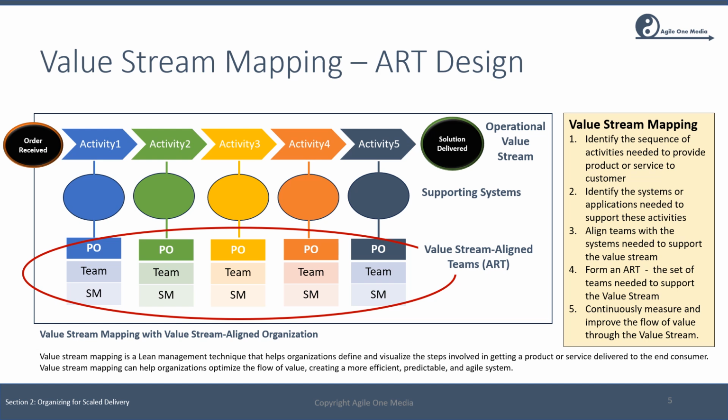The next step, step three, is to begin to identify the teams responsible for each of these applications or systems. Once we begin doing that, we may begin to see opportunities for refining existing team structures so that we will ideally have dedicated focus on individual activities in the value stream. This does not need to be perfect at this point. The goal is to minimize dependencies and handoffs and generally improve the flow of work across the value stream, or at least make a start in this process.